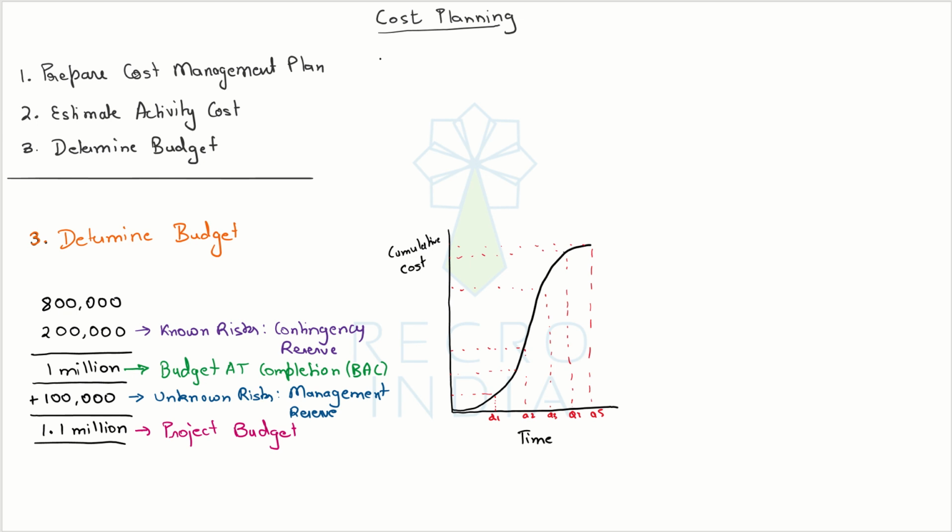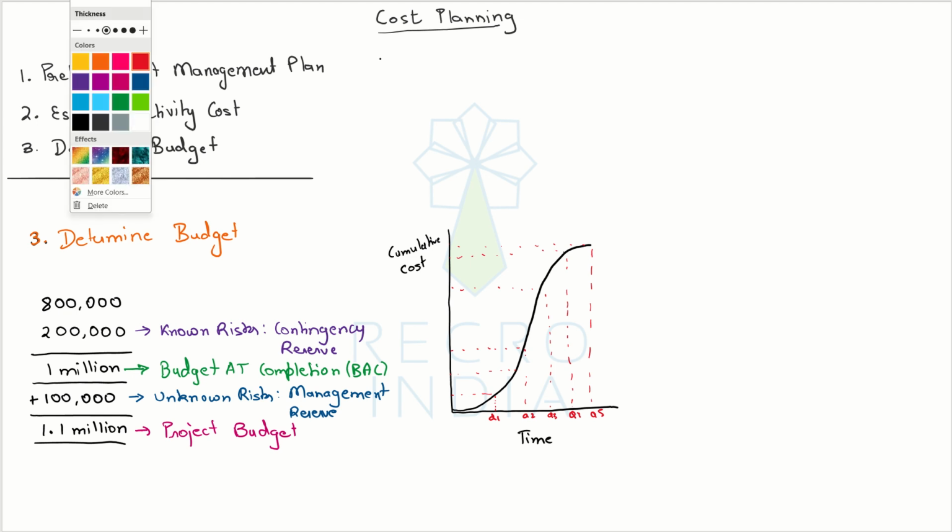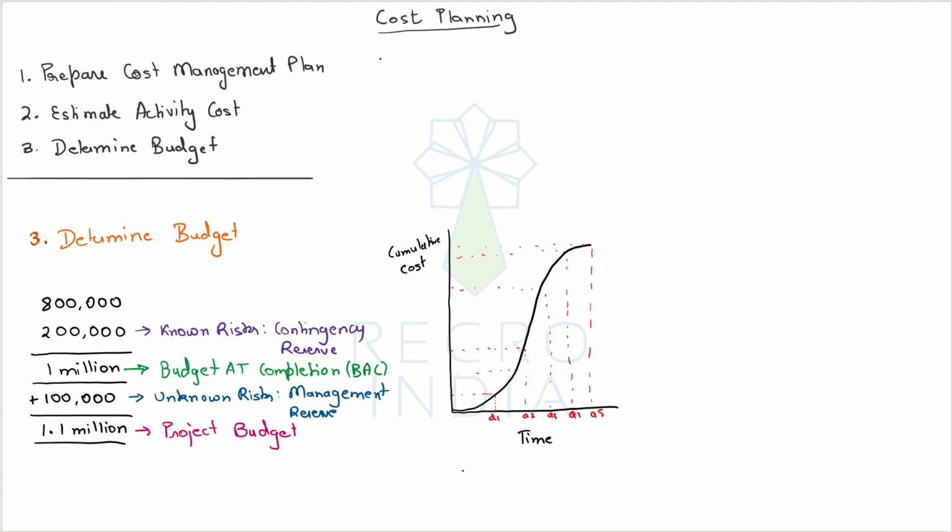However, that being said, it's possible that your sponsor doesn't agree with this particular arrangement. They might say that they don't have enough money in quarter 3. They can't provide you all the money that you're asking for in quarter 3 or in quarter 4 or in any quarter for that matter. This is called a funding limit: many times sponsors may impose a funding limit, that they can't give you more than a certain amount of money in a selected period of time.